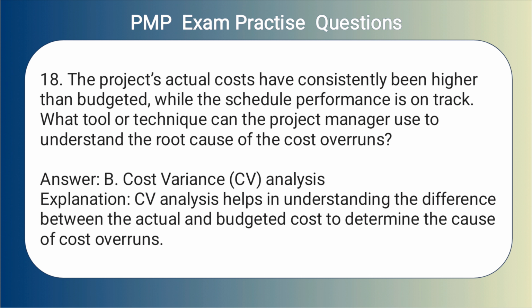Answer B. Cost variance, CV analysis. Explanation. CV analysis helps in understanding the difference between the actual and budgeted cost to determine the cause of cost overruns.